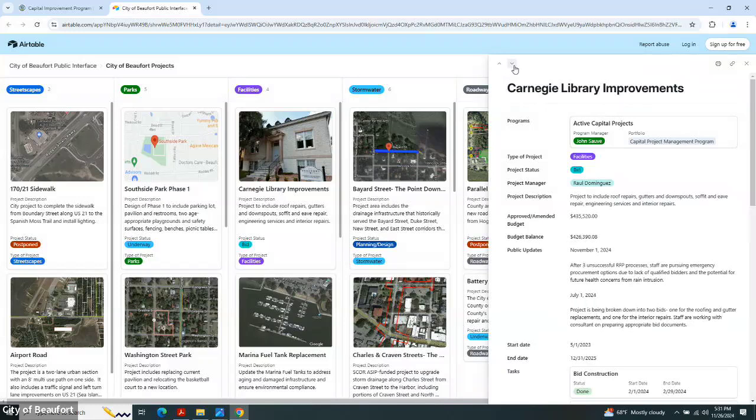As a background, we know that this project was bid out three times previously, and we were unable to find a suitable contractor. We have, however, found a suitable contractor that can do the work. We have also met with Metters, the city's architectural conservation group that we work with out of Charleston. Betty Prime from the group has had conversations with the contractor. We've met on site. He was able to actually find a match for the clay tiles for the roof.